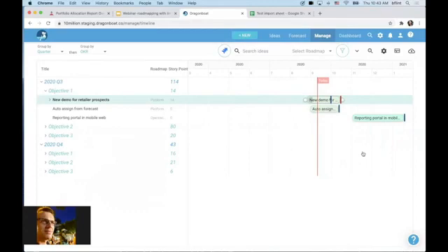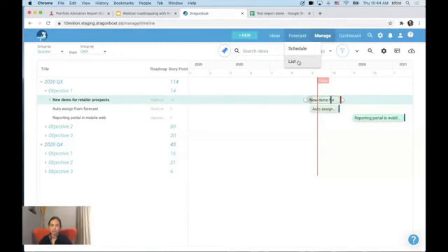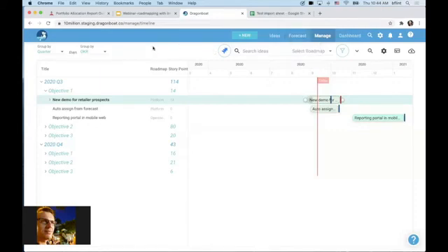Yeah. So basically, when we estimate the effort in the roadmap, and we do it by idea and quarter objective idea in the forecast, here we can use the same measurement tool as story points. You see what I mean? Right. You can say it should take us 10 story points. And later on, when we go to the actual quarter and actually have the Scrum team take the commitment and allocate story points in Jira and use this manage feature here, you can see that it was 14, and in the other screen, later on it will be on the same screen, I'm sure, you just mentioned it was 10, so we can do a very good learning for the next project.